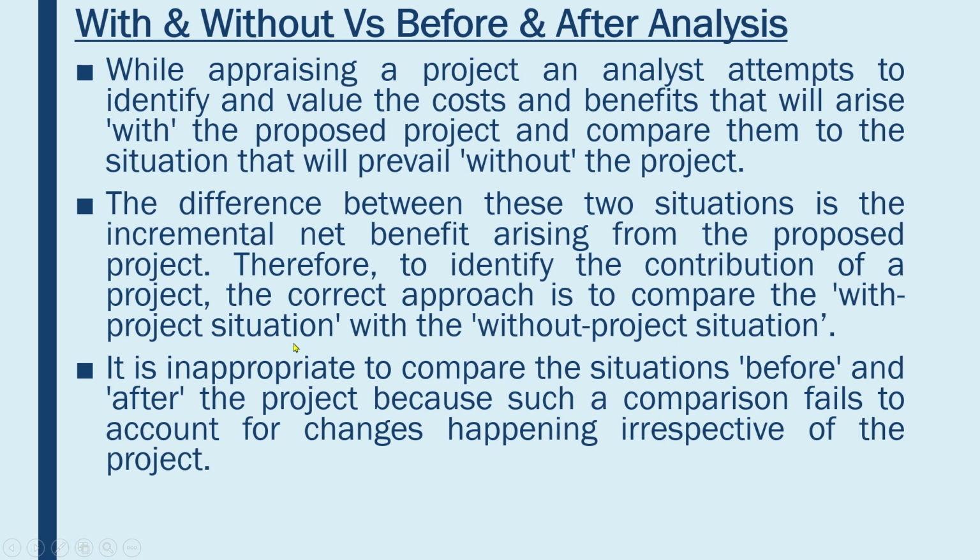With project situation, without the project situation. Very simple, there is not much to explain on it. The third one is it is inappropriate to compare the situation before and after the project because such a comparison fails to account for changes happening irrespective of the project.